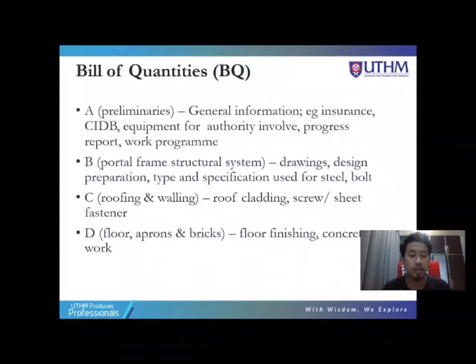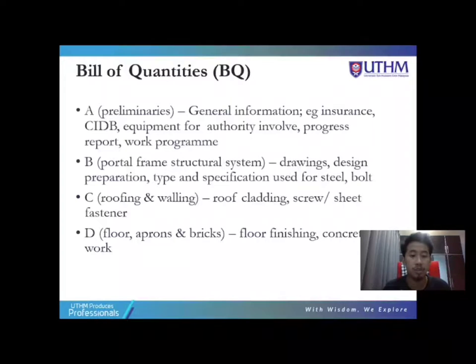Section A, Preliminary: it contains general information such as insurance, CIDB, equipment for authority involved, progress report and work programme.